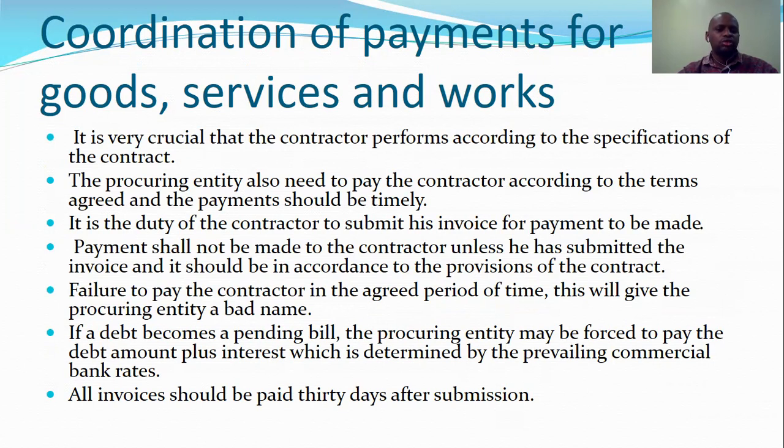It is the duty of the contractor to submit his invoices for payment to be made, and payment shall not be made to the contractor unless he has submitted the invoices, and it should be in accordance with the provision of the contract. Failure to pay the contractor in the agreed period will give the procuring entity a bad name. So it's always important to pay the contractor as you agreed in the contract.